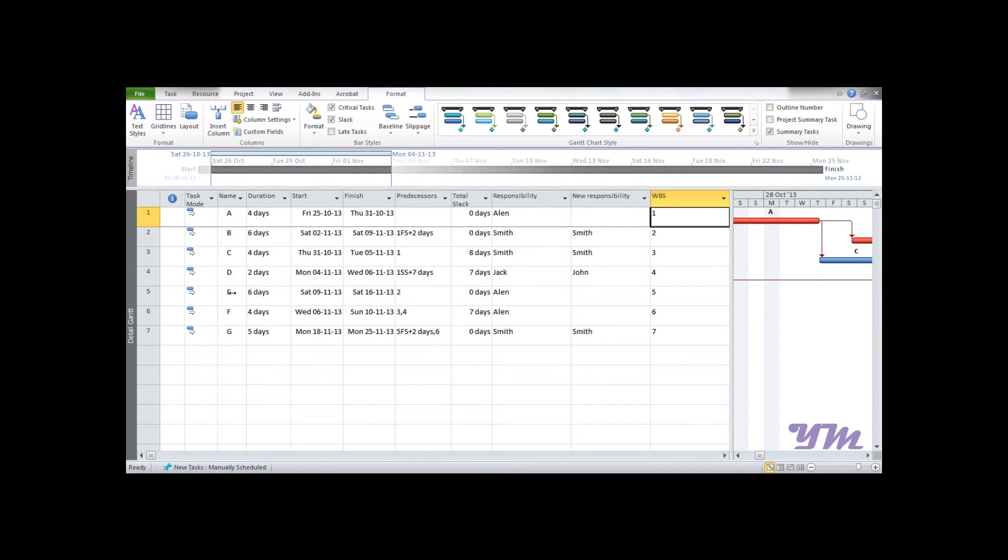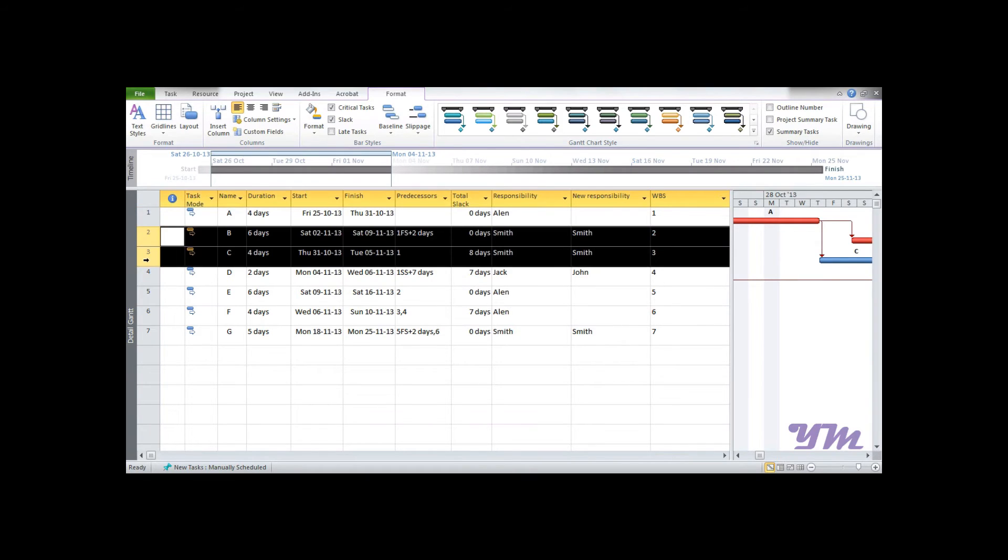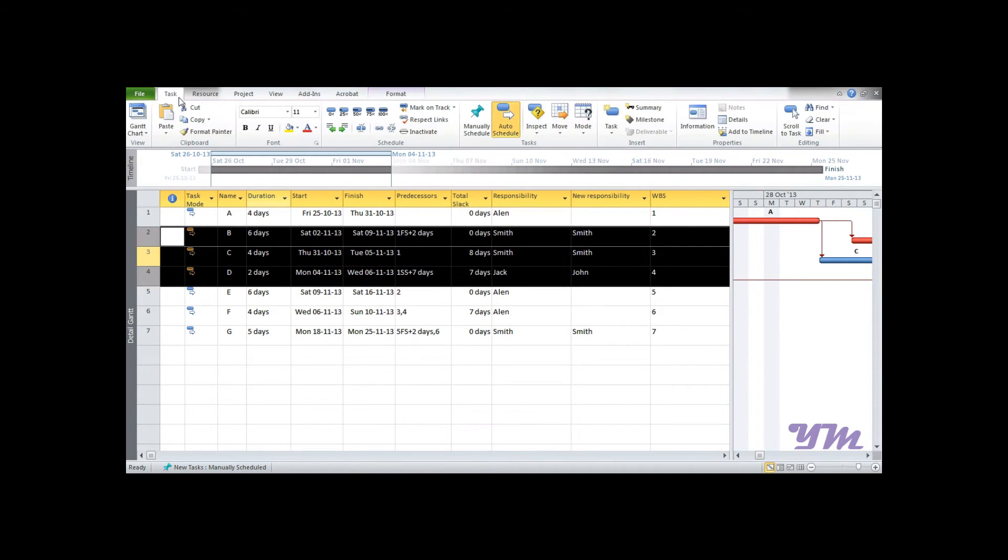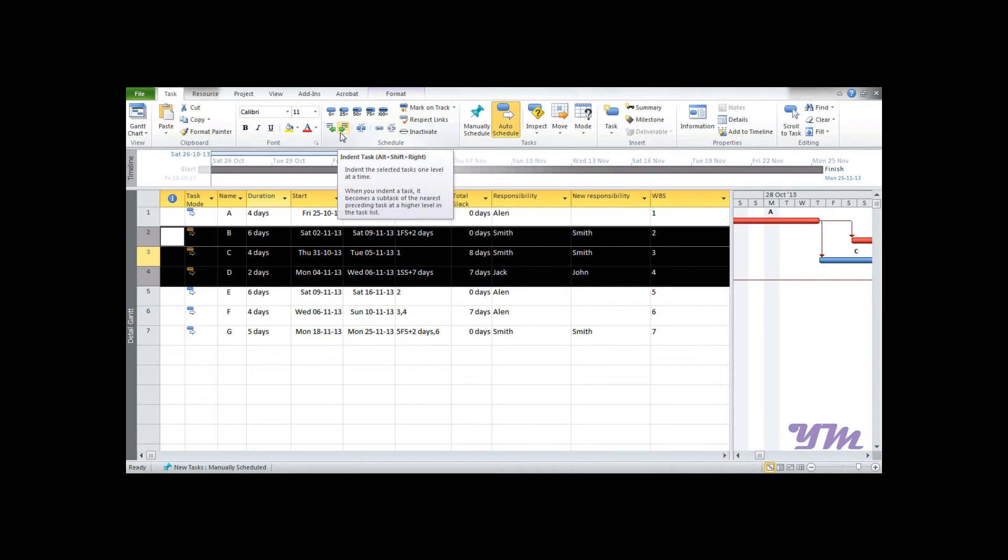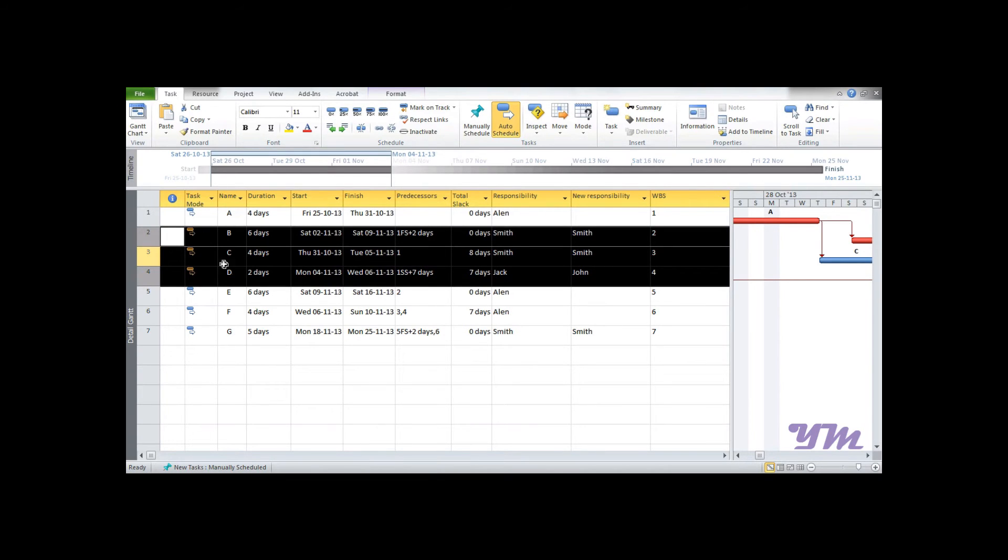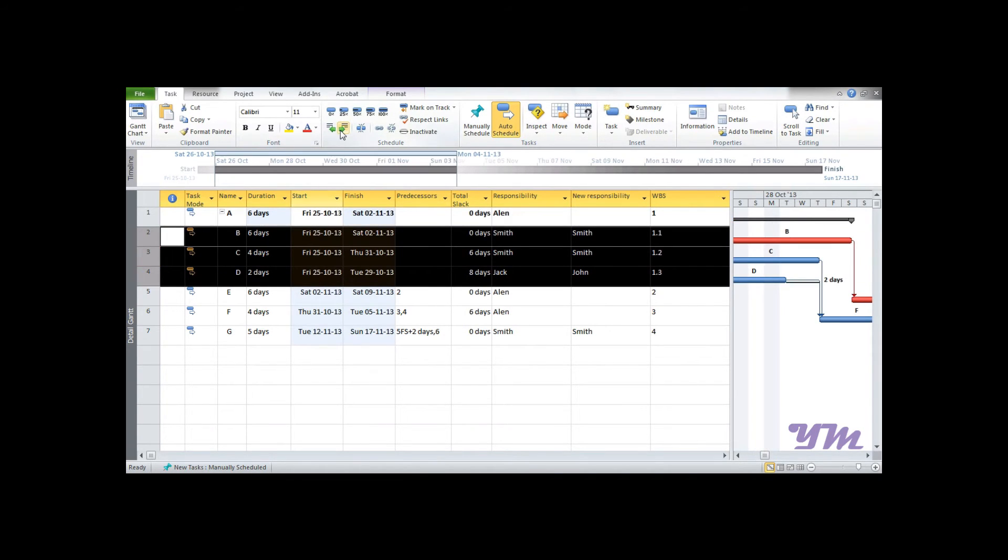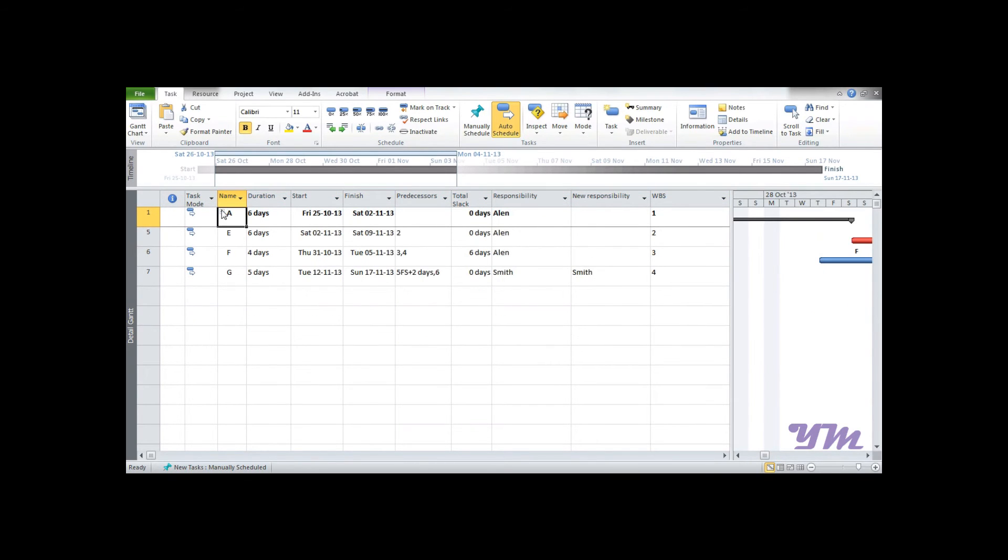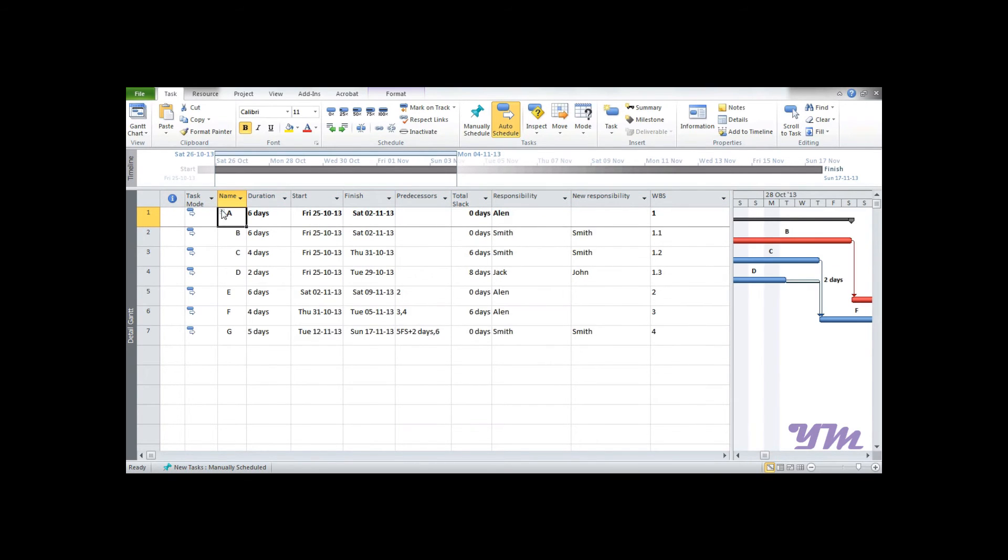So now what we can do is we can select B to D portion, and then from taskbar we can directly indent it towards right. So on pressing this button, just observe what happens over here. Once done, these all activities become a part of A. Can you see this?